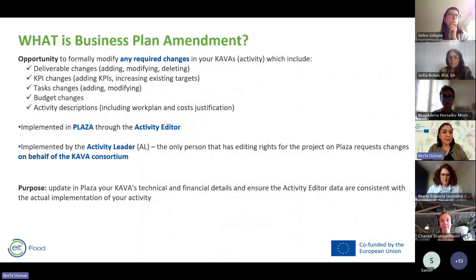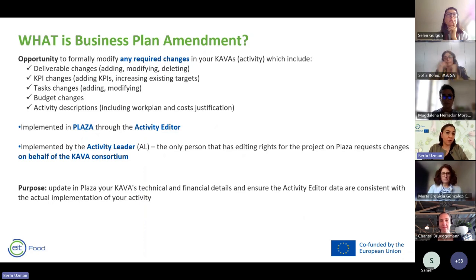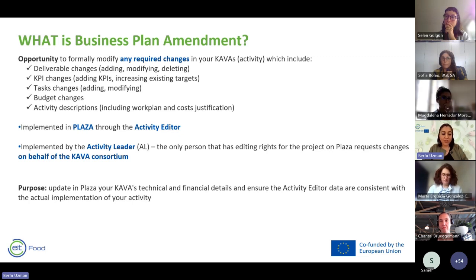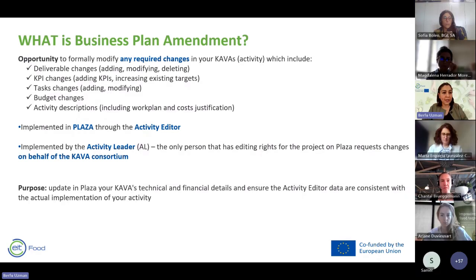What is the amendment we are talking about? This is the opportunity to formally modify any required changes in your KAVA. These required changes may include a deliverable change — either adding, modifying, or deleting — a KPI change such as adding a KPI or increasing existing targets, task modifications, or budget changes, which is likely the most critical one.